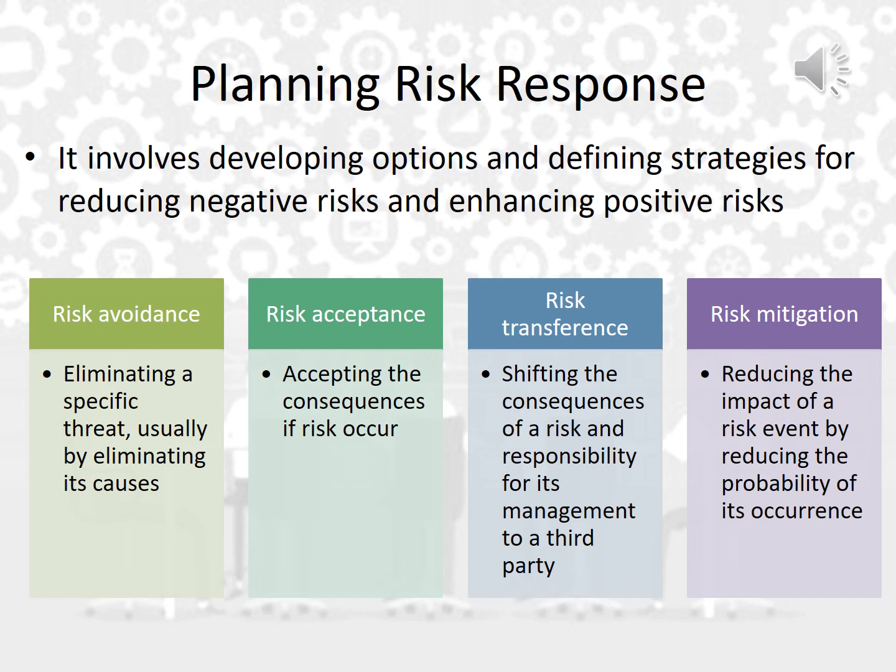That's one strategy. Now, the second strategy is called risk acceptance. So I'm accepting the risks and the consequences that come with it if it occurs. Consequences معناها العواقب أو الآثار المترتبة على وقوع الخطر. So here I'll decide to buy the portable hard disk, despite the threats that it can go out of my hand and get damaged, or it is not working properly or whatever.